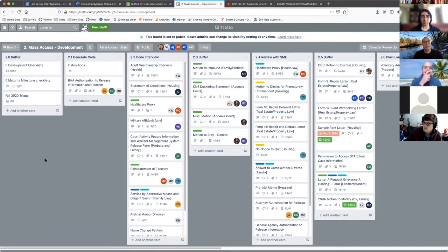And the basic idea is that you have tasks or things that you want to do, and you assign those cards, and each one of these little things is a card, right? And the nice thing is you can move these cards across these columns. So the idea is that workflow flows from left to right. You'll start off maybe with, traditionally, something called a backlog, which is all the features or things you want to work on in a giant big pile off on the left. And then as certain tasks were done, you would move them from one column to the next.